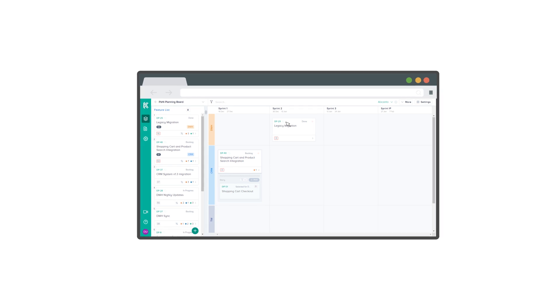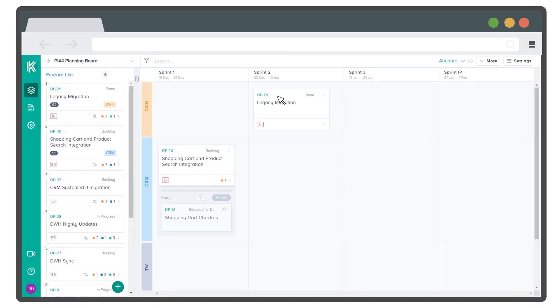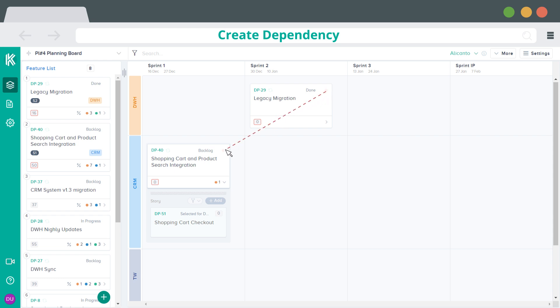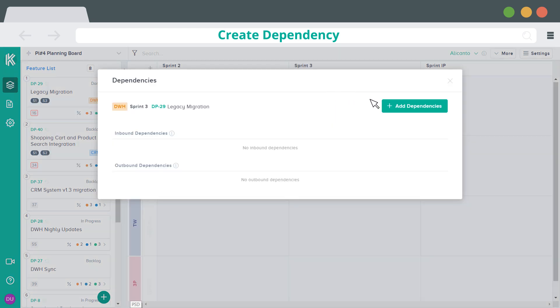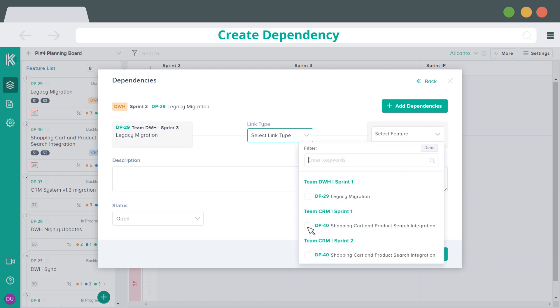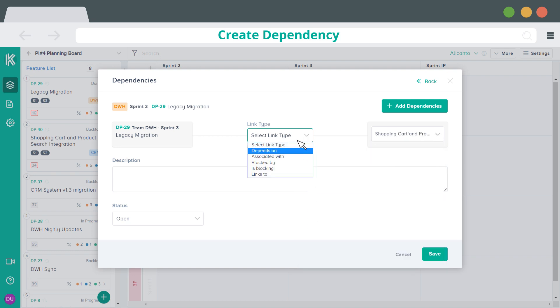Kendis makes it easier to visualize and track dependencies. To create dependency among cards, drag from one corner of the card to the other card or click on the dependency icon and search the item.